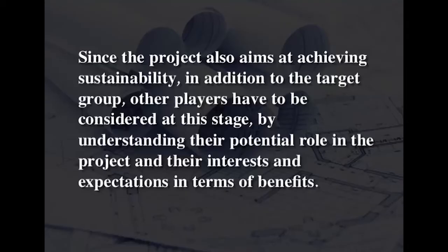Conducting a stakeholder analysis and selecting the target group. The focus of a results-based project is the target group. Since the project also aims at achieving sustainability, in addition to the target group, other players have to be considered at this stage, by understanding their potential role in the project and their interests and expectations in terms of benefits. Right at the beginning, it is therefore necessary to identify all the stakeholders likely to be affected by the project and analyze their potential involvement in it.